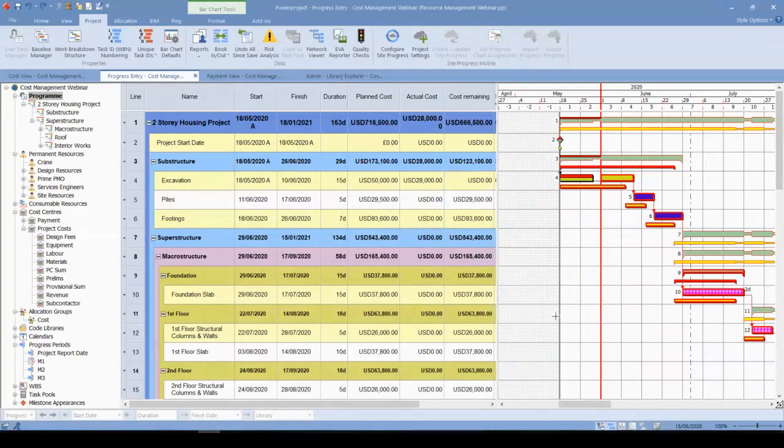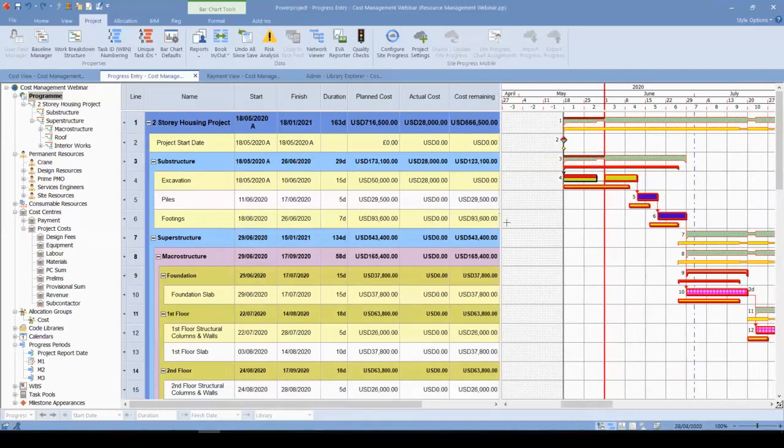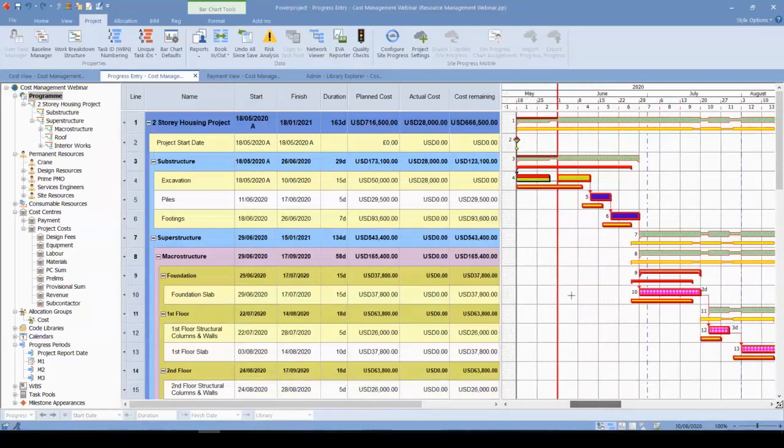Of course, this is the main problem that the project faces. The project controls and cost control teams are seeing that they've earned these values, but the payment is almost 15 days or 30 days delayed. That's why they can suffer with the cash flows.